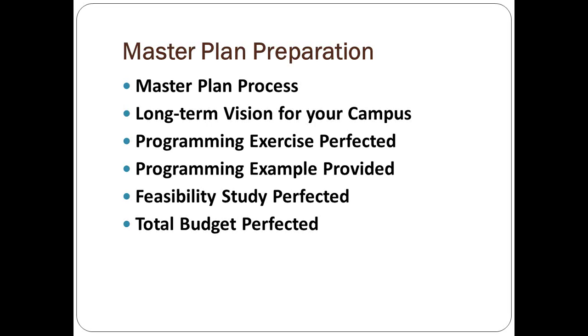You can pick the cost of the project and decide this is how much we're going to spend, or the size of the project, and then the quality is dictated to you. I wish I could give you all three, but I've never seen it where they could dictate size, cost, and quality of the project and get all three.